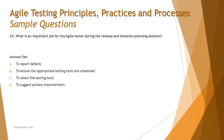Moving to Question 24, which asks: what is an important job for an agile tester during the release and iteration planning session? We discussed a specific topic about the responsibility and contribution of a test engineer during release and iteration planning. Option A says 'to report defects' — it's a planning session, so there's no scope for reporting defects at this point. Option B says 'to ensure the appropriate testing tasks are scheduled' — yes, scheduling is a part of planning.